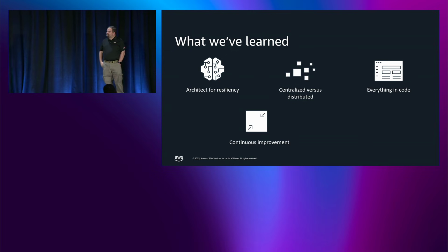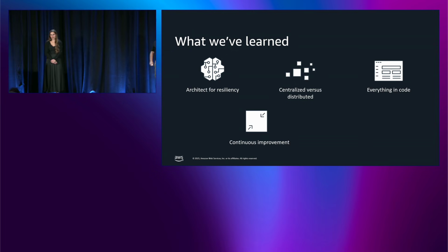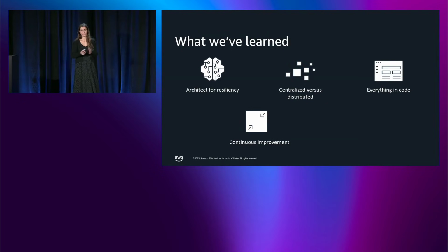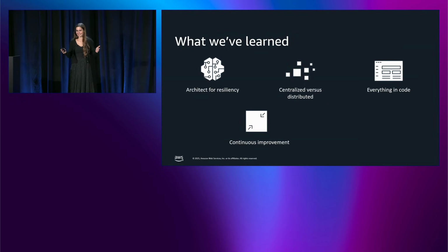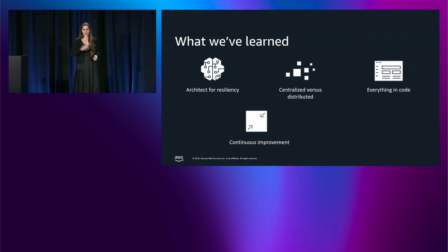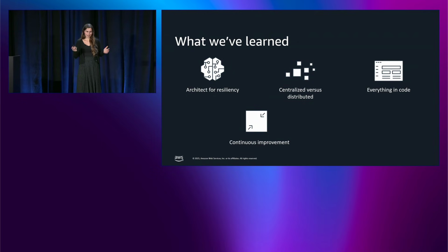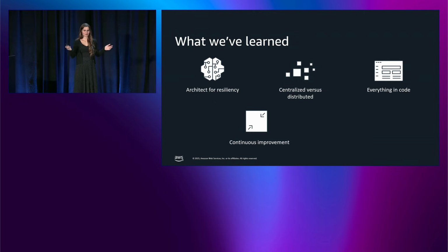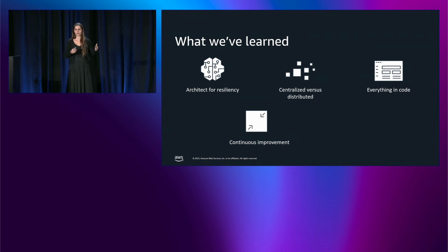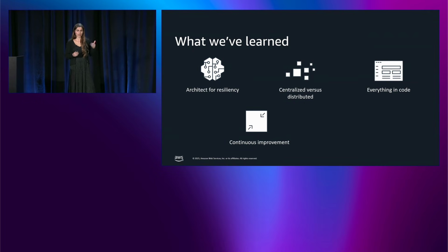Then we have continuous improvement. So we'll use builds as an example. Builds are a very, very long project. And so there's a tendency to say, oh, we'll talk about lessons learned and retrospectives once the build is done. The problem is so much time passes, things have changed, people forget. So we really encourage to continuously look at what didn't go well and iterate quickly.